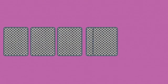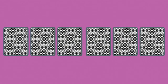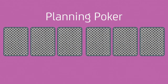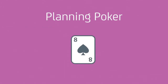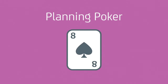There are a few sizing techniques. The one that offers the deepest insights is planning poker. In this approach, the team discusses each item in the product backlog, and then each team member chooses a playing card to represent the relative size — a point size. The team members then reveal their cards all at once. They might each have a different point, so the Scrum Master facilitates discussion. Why does Bob think the story is a 3 when Sue thinks it's a 13? Through discussion aided by the product owner, the team comes to understand the story and agree on a high-level design or approach, eventually settling on a good enough relative size for the story.